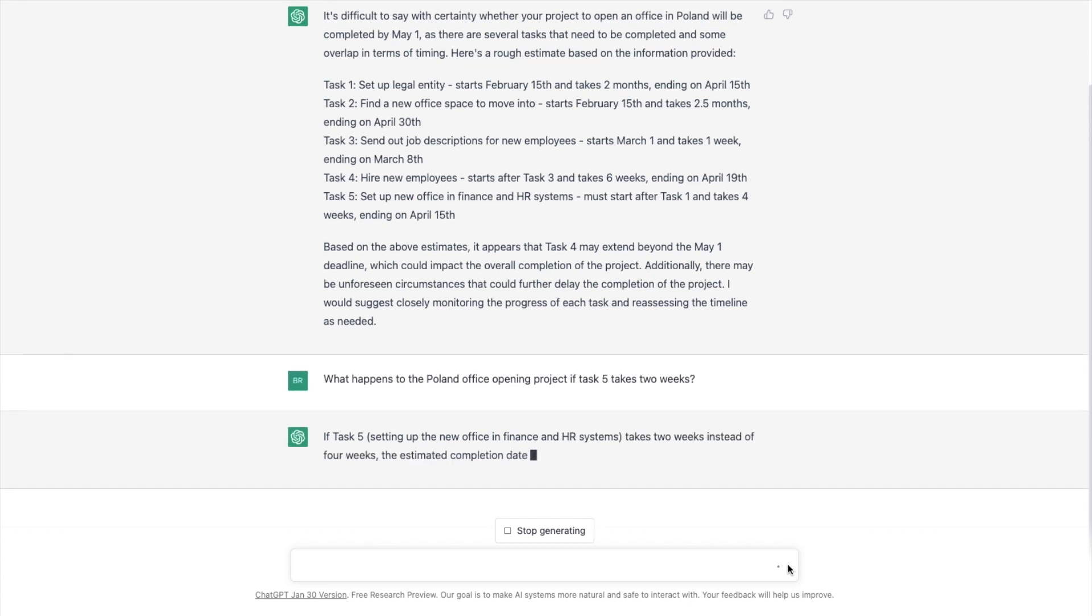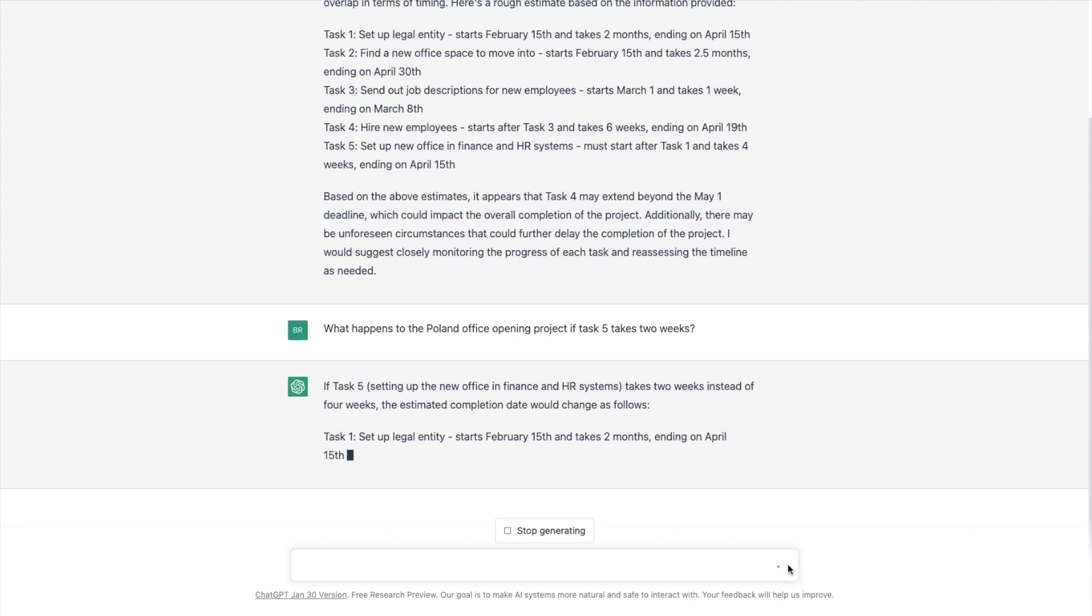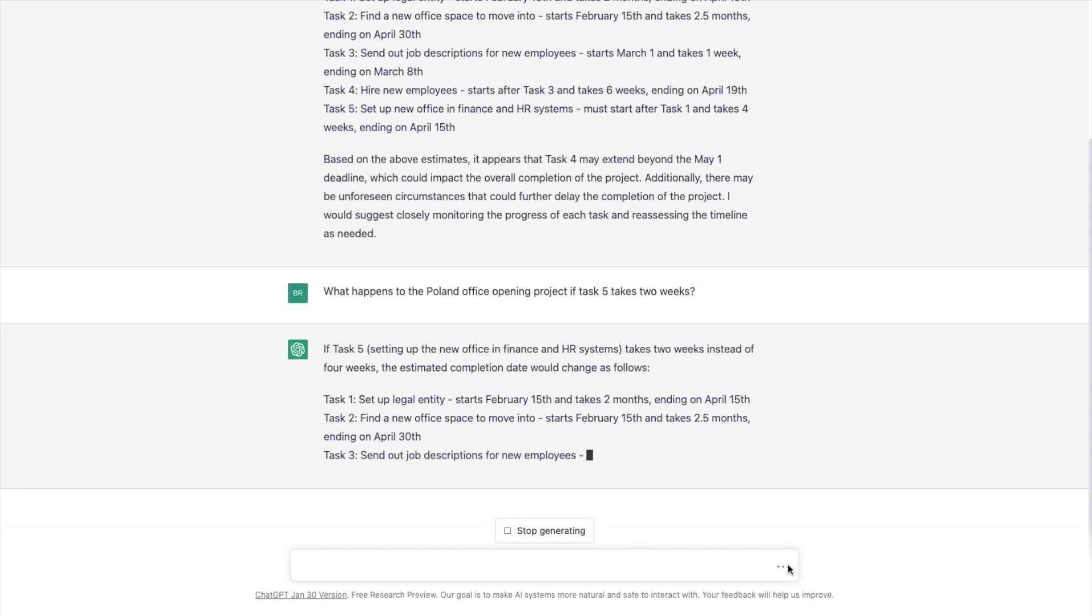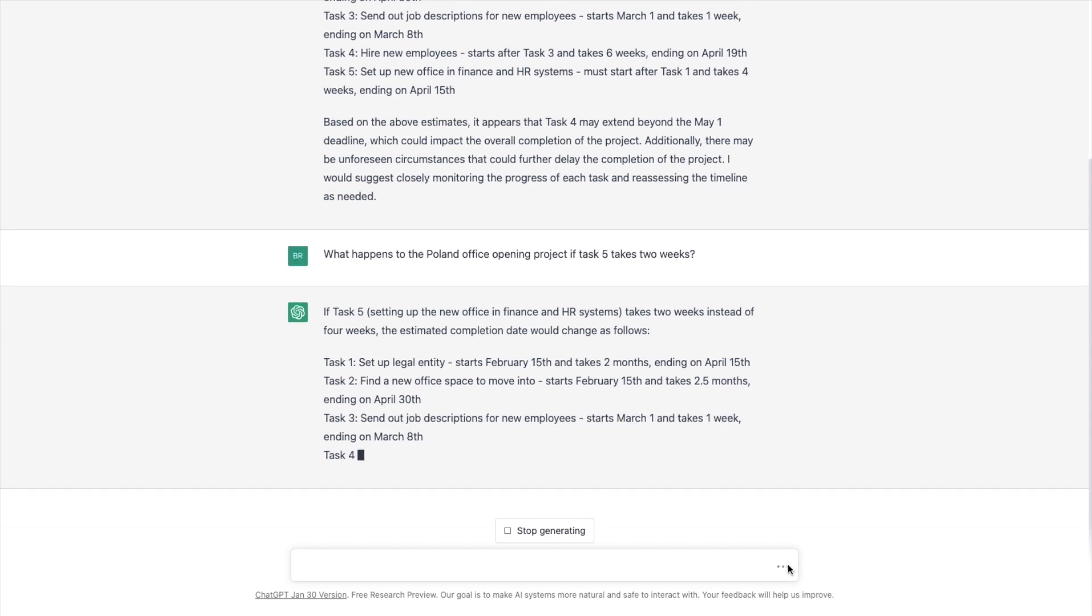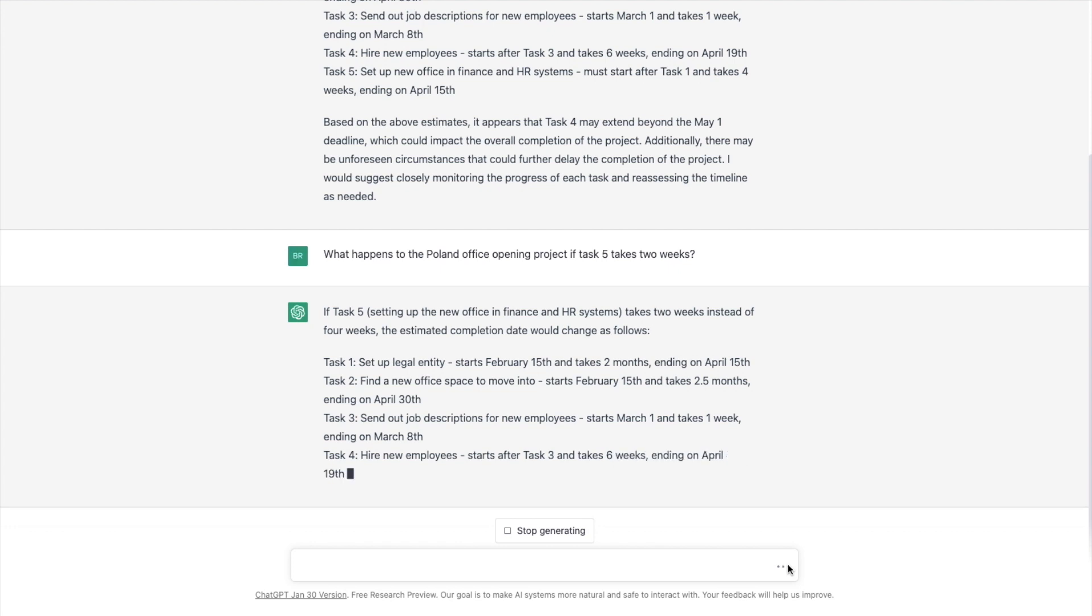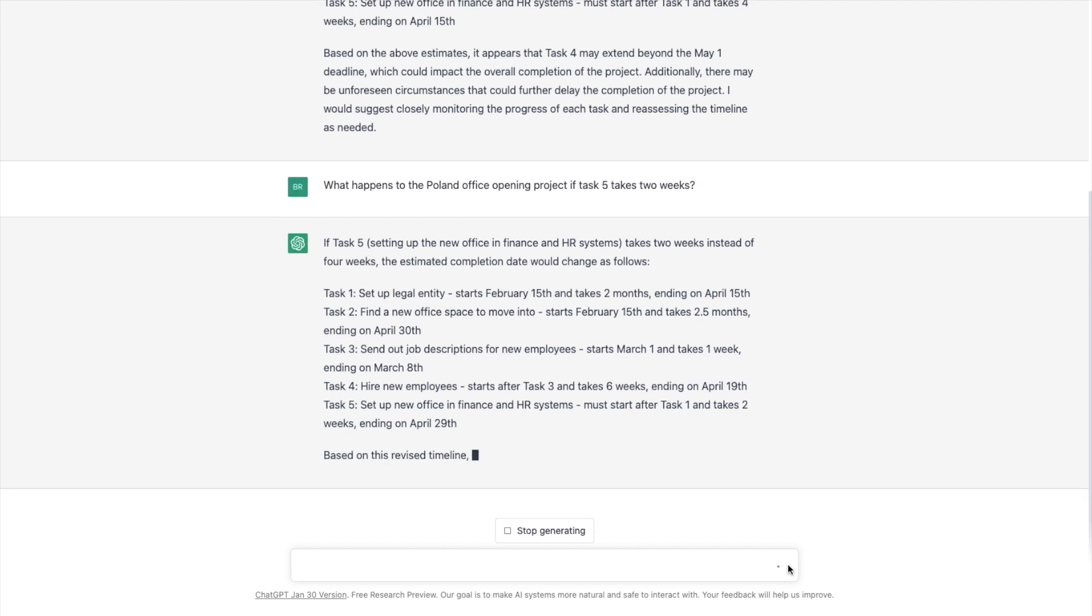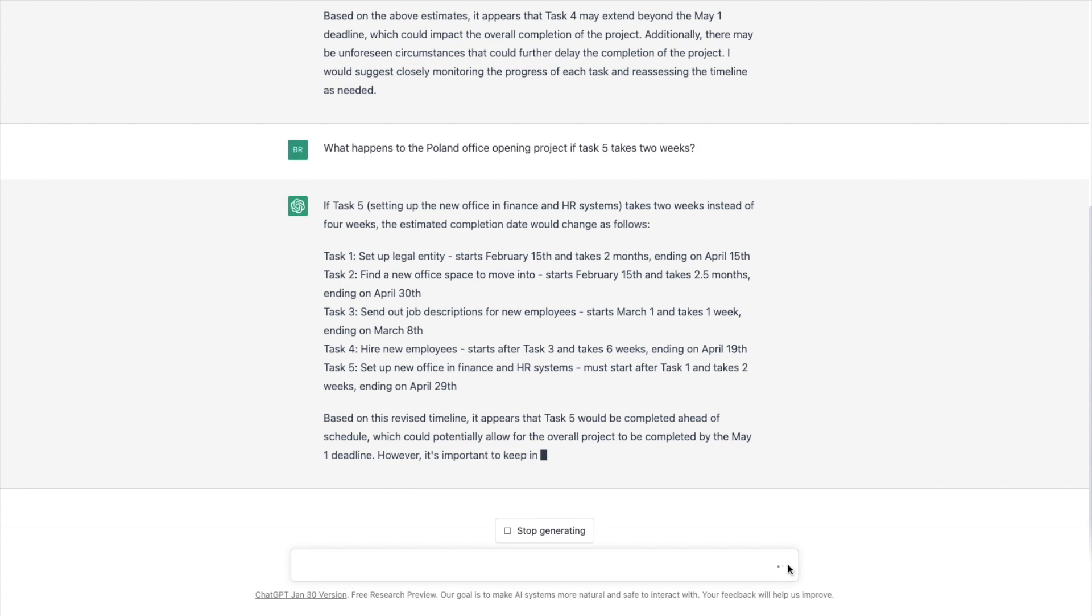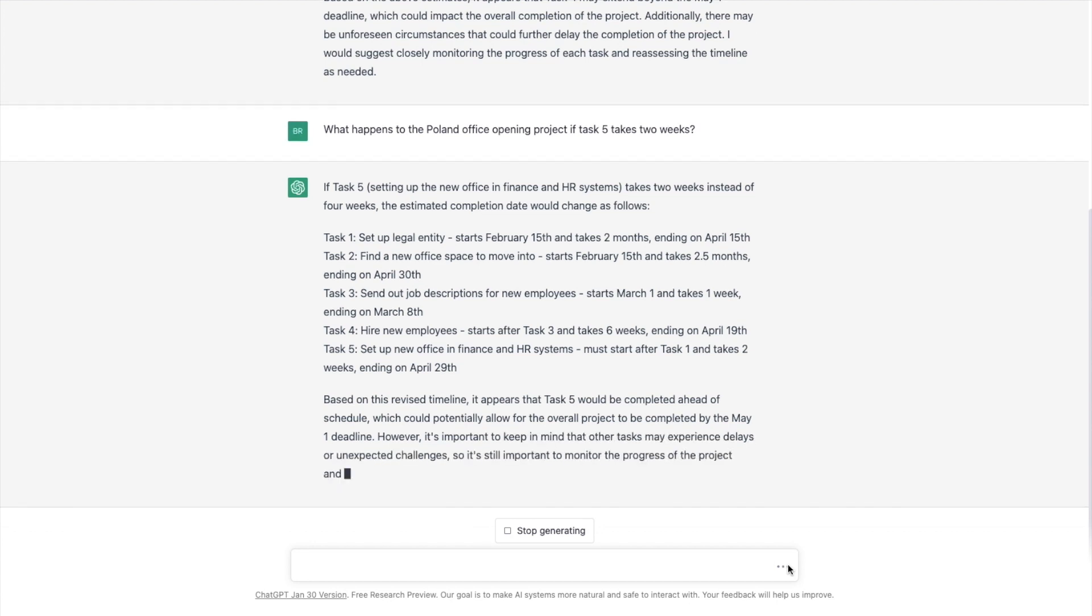So if task five, setting up the new office in the finance and HR system takes two weeks instead of four, the estimated completion. So it's completely recalculating the project and is moving a lot faster also, which is great. It was moving so slowly. So here it's spitting out the new dates and two weeks ending on April 29th. Based on the revised timeline, it appears that task five would be completed ahead of schedule, which could potentially allow for the project to be completed by May 1st deadline. So it also talks about the challenges. So that's great.